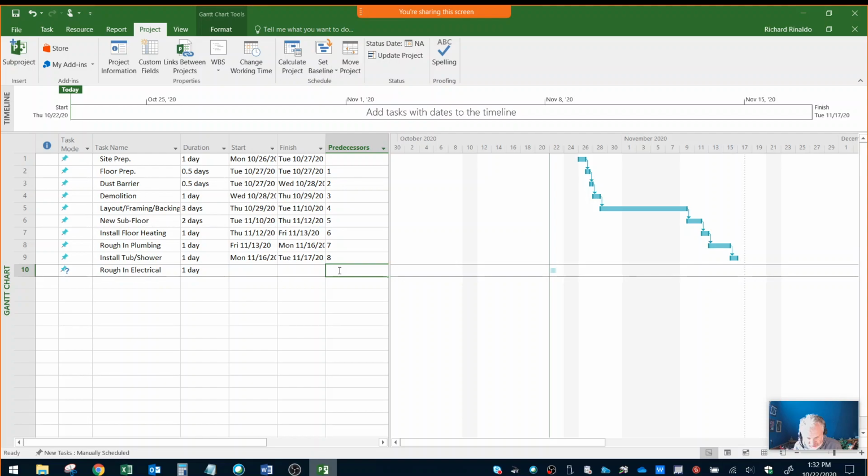And then there's drywall, 2 days, and that's task dependent upon 11 being done. And then I have the apply the red guard, and that is 2 days. Now, for this one, I may say, okay, once the drywall's done, I want it to dry for, let's say I want it to dry for 2 days before I start with the red guard and the moisture resistant board.